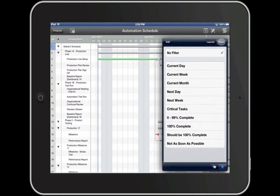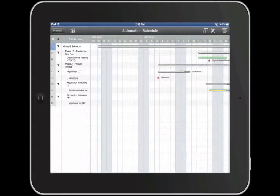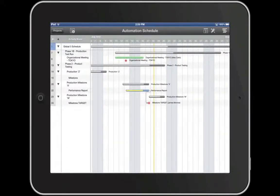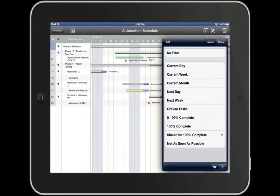An example of a useful filter might be 'should be 100% complete,' which is already provided in FastTrack Go. You can then get a quick report of which activities should have been completed. Filters is a very powerful report-generating tool and even gives you the ability to search across the schedule and resource views, discussed more in depth in our FastTrack Schedule Go Filters video. To see your entire project schedule, apply No Filter.